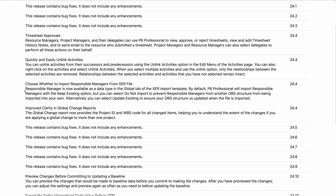Here's the next one: choose whether to import responsible managers from an XER file. Responsible manager is now available as a data type in the global tab when importing XER files. By default, previous versions of P6 would always import the responsible manager if it didn't exist and add it into your OBS global data. For those working in large organizations, this was a nightmare — we were adding extra data and screwing up our responsible manager OBS structures just by importing.